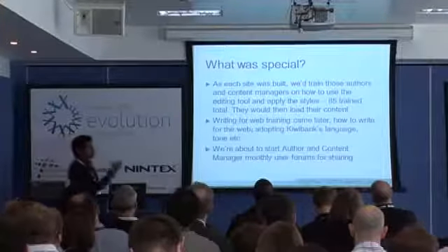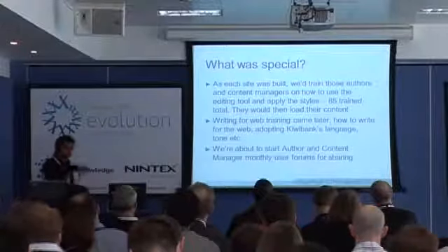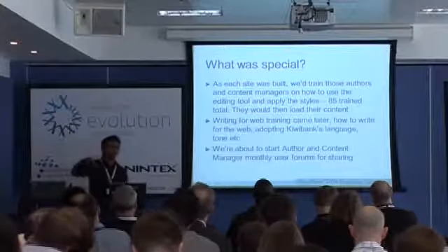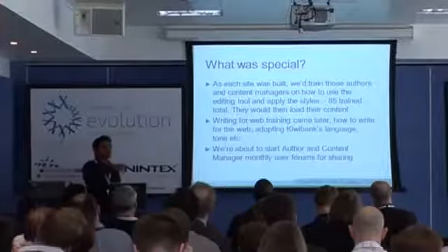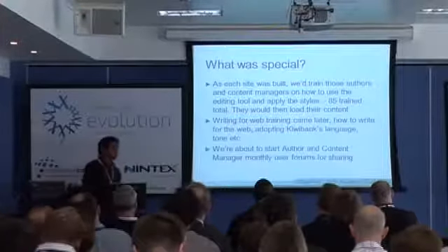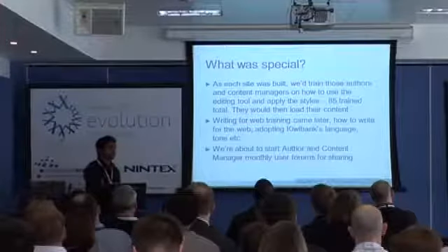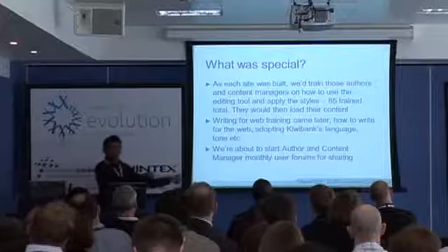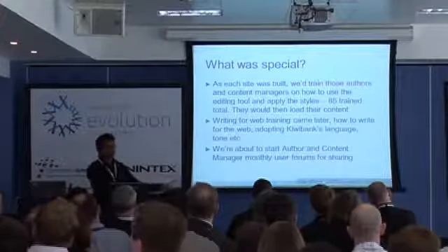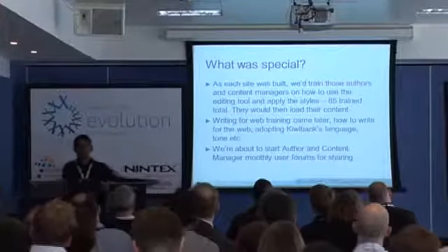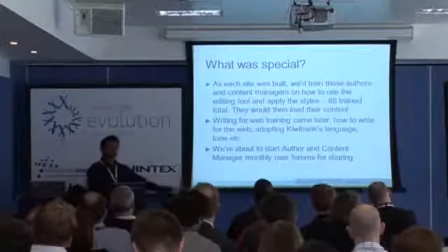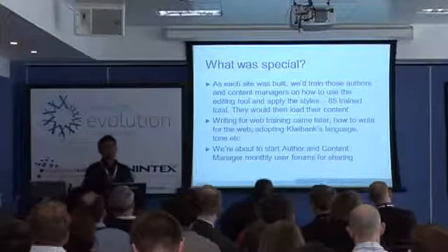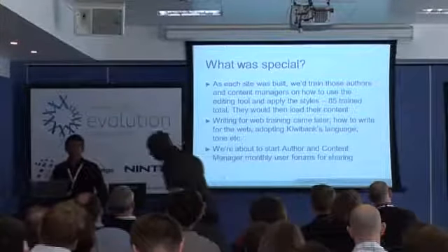So how we did it was to get 85 people across the bank, which is quite a challenging thing. We asked all the general managers to nominate people who would be the best people willing to participate in this as well. Because the worst thing you could do is suddenly say, here's the intranet, go and create pages in it, and they go, well, I've got a million things to do, I don't want to be creating pages. So if you engage with them early on and get them to nominate who the best people are, you're going to get better buy-in in terms of your content being refreshed and so forth.